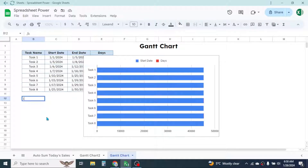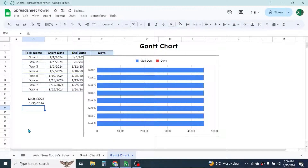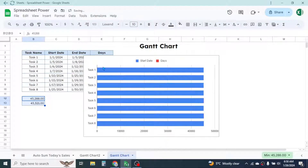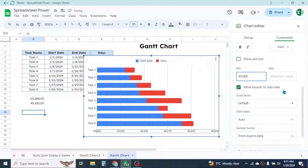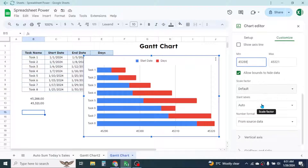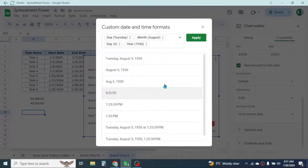We'll use December 28, 2023 as the minimum boundary and January 30, 2024 as the maximum. Type these two dates into cells, then convert them to number format by selecting the cells, going to Format, then Number, and choosing number formatting. This gives us the numeric values for the two dates. Go back to the axis label settings, double-click, and enter the minimum value — 45288 — and the maximum value — 45321. Then go to the number format option and choose the date and time format, and select the date format.